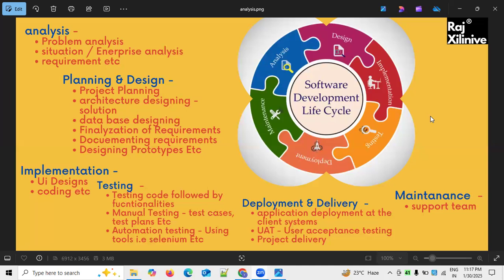When we are proposing a budget, normally we give it in two ways. One is fixed budget, second is FTE based. Fixed budget means to develop the project, we give a fixed cost. For example, $5,000, roughly speaking. So we want $5,000, and whatever the project requirement was, we prepare it completely and give it to you, but it will take $5,000.